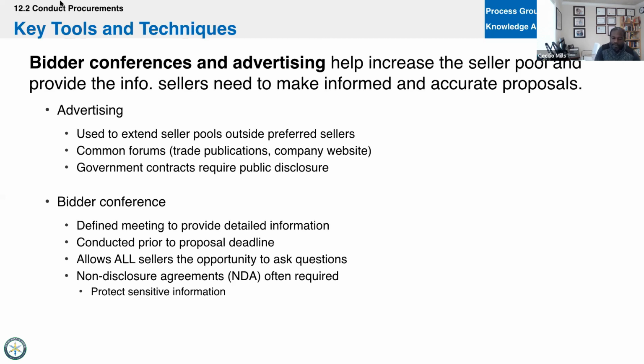The idea is a couple of things. It saves me time. If 15 people emailed or called me about the same question, I don't have to answer it all the time. I can just answer it once and everybody gets it. It also minimizes the chance that somebody says, hey, you gave this person extra information about how to best create a proposal and you didn't tell me. You're showing favoritism, you really just want to hire that vendor. It reduces my liability of being sued for that. I've been on the end of the person who writes up all the answers.